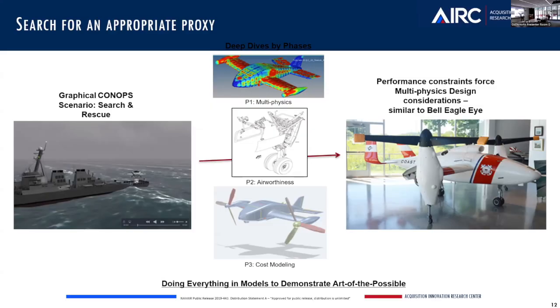And they had two different landing gears. One was hydraulic, and one was electric. And when I start doing the analysis, it turns out one of the two, I believe the hydraulic one, was a little bit more expensive, so it didn't meet the cost requirement. But then you have the other one, which was less expensive but couldn't quite meet the same landing rate. The landing rate was 180 knots, but that one could land at 170 knots.